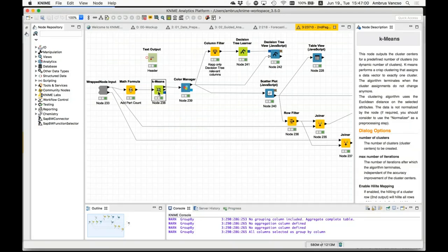That's also the beauty of it, and that's why, as I said, it's a usable tool for prototyping, because in prototyping you have to be able to iterate fast. That means even when you build the interface, it will consume significant time, right? So in our experience, building an interface for a machine learning prototype will take easily something like 1/3 or 40% of the team's time. Well, it's a good investment, right? To help the business users follow and track the model.